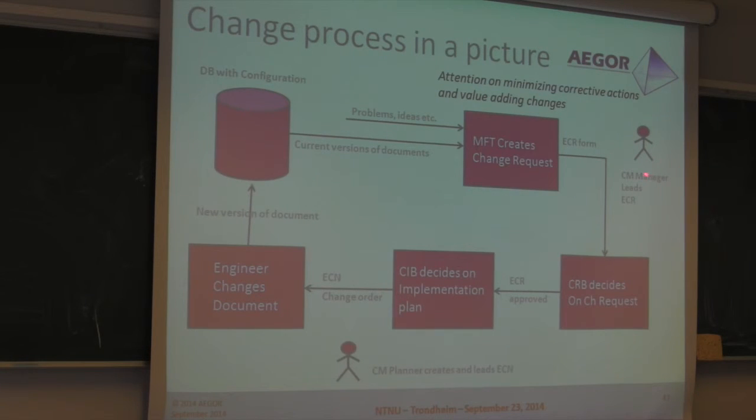He has to decide whether it will be a fast track, meaning passing the board and going the fast way. If you go to the board, these are 2-3 persons that can decide about everything. Now these people come together once a month, not every day.